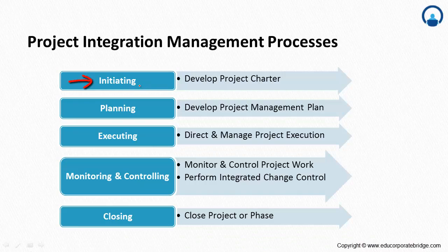As I said, this is the initiating process group and this is develop project charter. As part of the project initiating process group, there might be a set of processes involved, but develop project charter is the process that becomes part of project initiating and comes under project integration management. Another process listed as part of project integration management is develop project management plan. This becomes part of your project planning, and direct and manage project execution will become part of your executing process group.